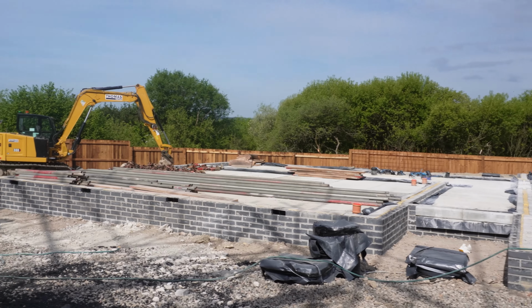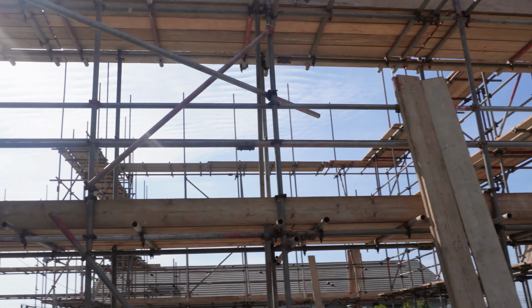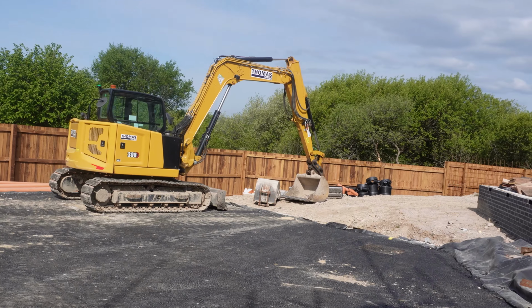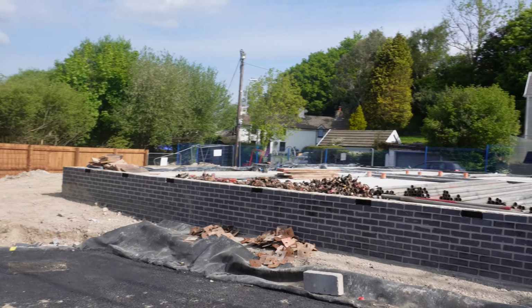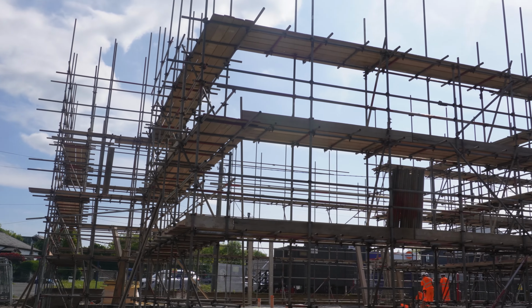The scaffolding is going up for block 1 and then we're going to move on to block 2. The timber frame on this site will be pre-brick slips, so as it comes in, the external wall will already be finished and it will go up really quickly. So we're expecting each block to take only a few weeks to go up fully, so keep your eyes out for the next video when these should be installed.